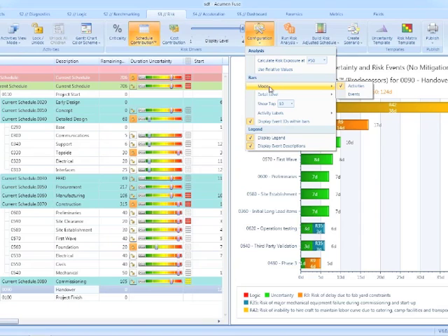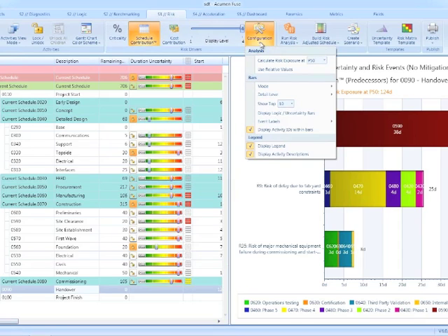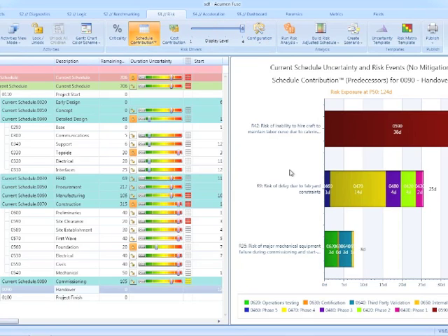Many of you have also said, well, it's interesting to look at the activity hotspots, but I need to be able to report back to my manager. My manager is looking at the risk register and saying, well, the top 3 risks in the risk register, are they big hitters in the schedule? So by rotating the tornado chart here, what we're looking at now is the risk events, and by risk event, it's now showing how much impact on each activity that risk event happening has.